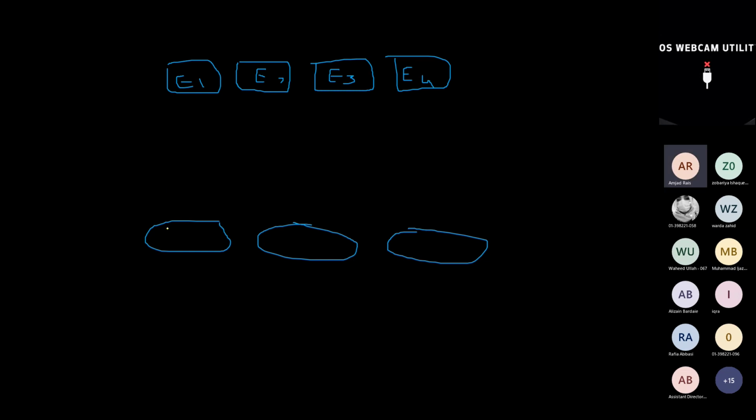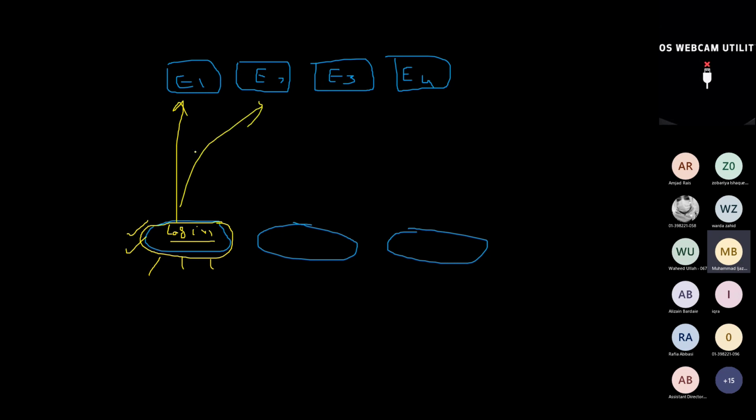For example, if I have to upload the assignment, I need a login. If I have to give you an assignment or mark your attendance, I need a login. If I need to download or enter your marks, I need a login. So this login feature, and many user stories related to login, may be connected with epic 1, 2, 3 and 4, all of them, correct? So we combine all such features.